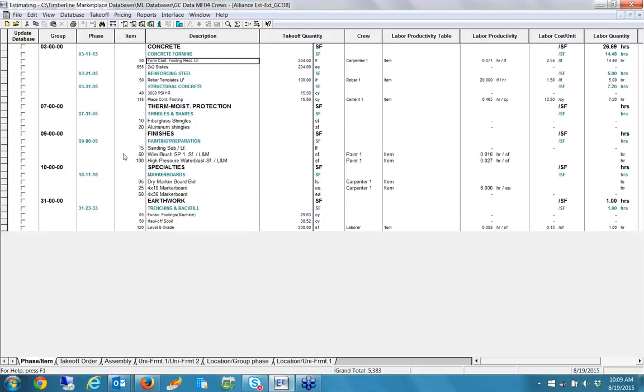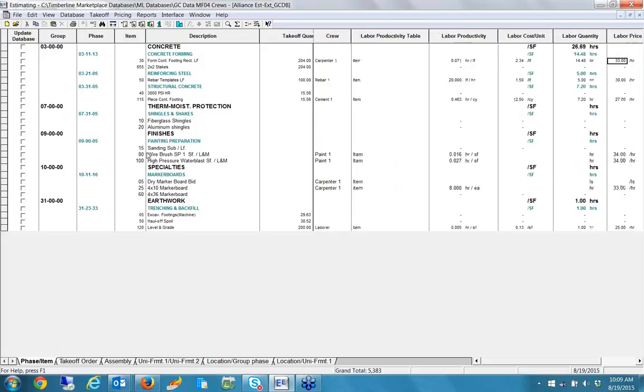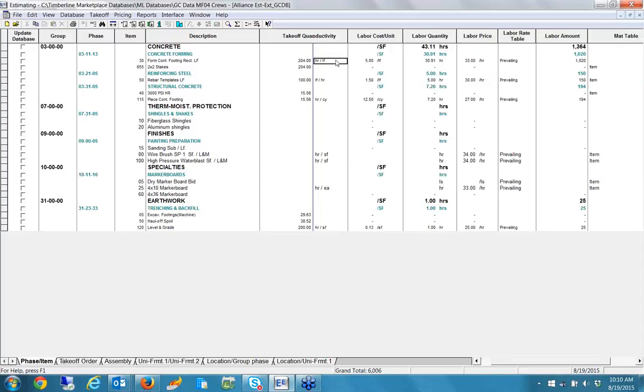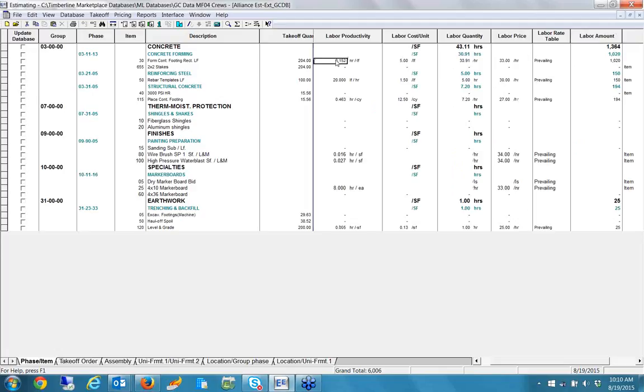One of the other fundamental differences between standard and extended is that, in standard, probably a better way to start, you have the ability to come over here and put a unit cost to the item, change that however you want, and even back it up further and have a production for your line items, for people that are doing self-perform work or want to do production-based estimating. But I can come in here and change this value, right? And you'll notice over here on the right is my hourly rate.